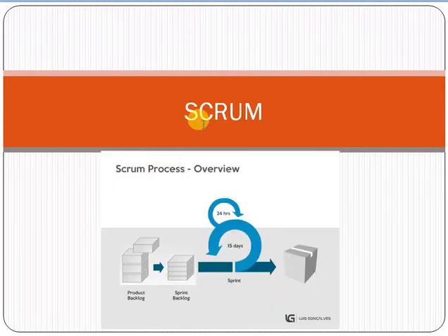Coming towards the Scrum approach. Let's assume that you have to deliver 40 tasks, so you use the sprint-based approach. Sprint means a time-boxed approach, like 3 to 4 weeks. You divide the 40 tasks into 4 sprints of 10 tasks each, and for example, you complete the first sprint and showcase your 10 tasks to the customer. If there is any feedback, he will give it to you. If there is any negative feedback, he will also inform you.